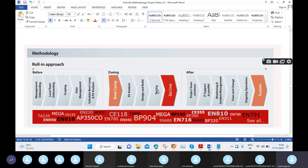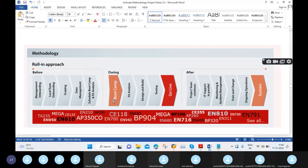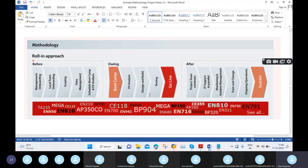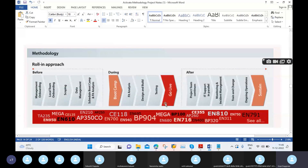During the project — meaning at the time of active project work — we have five phases: Boot Camp, Fit Analysis, Design and Build, Testing, and finally Go Live. Once the project moves to go-live, we transition to the after phase, which is clearly explained in the methodology.